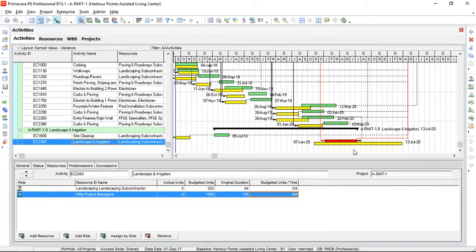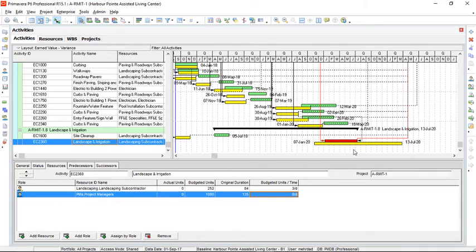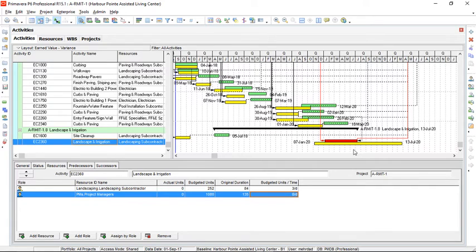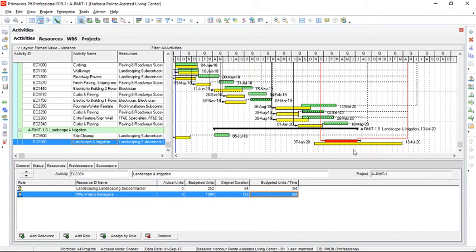I have a suggestion. In order to see the effect of this duration reduction on the total or whole project duration, we need to have proper relationships between the activities. If reduction of time for this particular activity is not reflected in reduction of the project duration, it might be because we are missing some relationships and connections between activities. It's a very good practice.